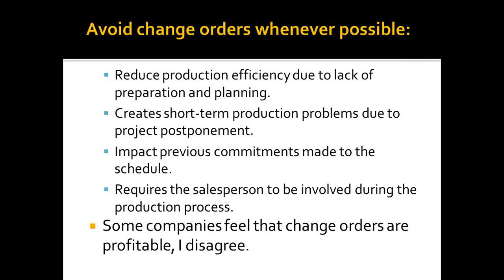One of the other things I see companies doing is they'll start the next project, but they'll actually split the crew into two. Most companies don't have a foreman at the same level, so you're starting that project. The foreman may not be as comfortable or familiar with the project, and so now you're really hurting two projects, and you're really not going to get both projects done any faster. So I certainly wouldn't recommend splitting up your crews as you go through, trying to keep on that schedule.